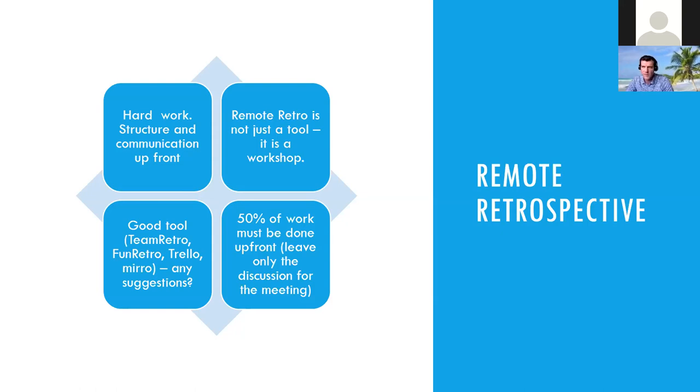How long is it? In a working environment, I had 1.5 hours. In retrospectives, in home office and online, I never crossed the 1 hour line. If we don't manage to tackle all the problems, we need to catch up. But I see that a 1 hour discussion is plenty.